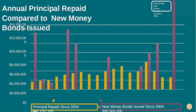I think you answered it well. Yeah, I get it. That's the point is that if you sell them all at once, you pay from the beginning, and if you phase it in and it matches the construction period, which we've done successfully the last several years, it's worked out better. You save interest costs, and that money piles up in the debt service account to speed up the process for the next. Okay. So, builds on itself.